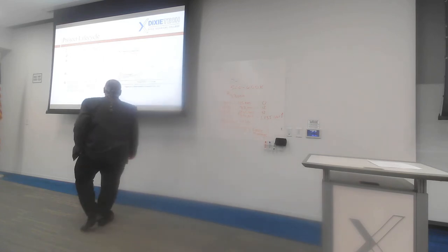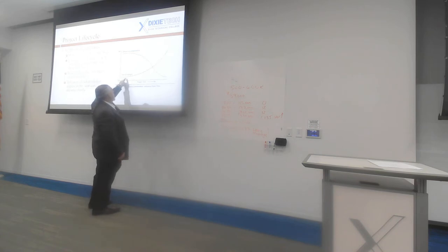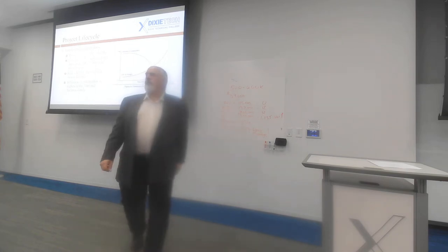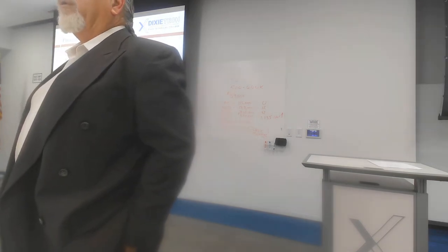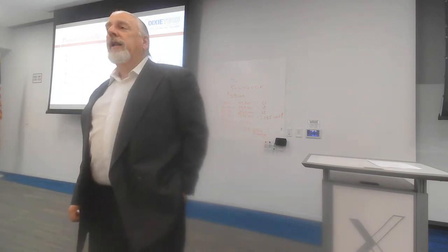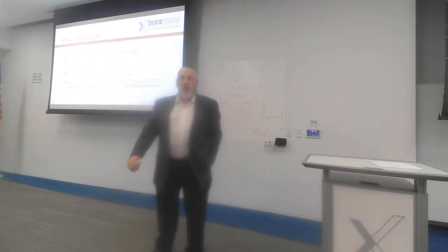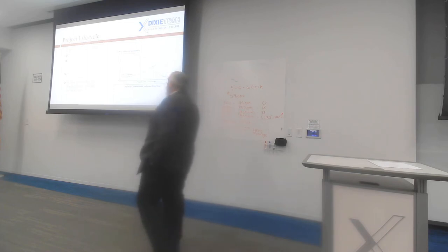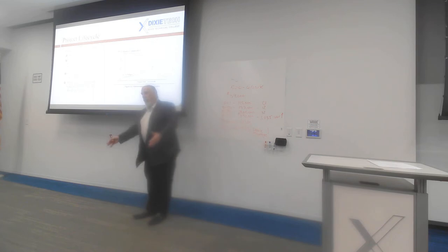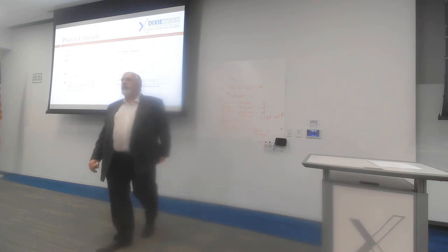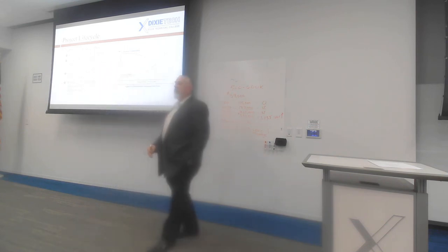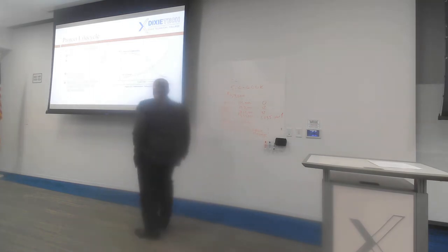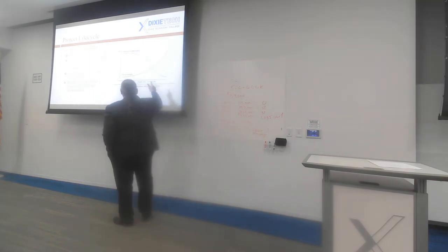The interesting thing about cost is that as we get more and more invested in the project, it becomes more and more difficult to change. And yet that's when the changes most often occur. People see it and they go, wow, I just saw the drawings. I didn't realize it was that big or that small or whatever it is. And so they're going, can we blow a wall out and move it out 4 feet? Well, sure you can, but it's not free. We've got to tear it down, and those materials aren't going to be reused. And so the change is possible, but we are so invested that it's going to cost more and more